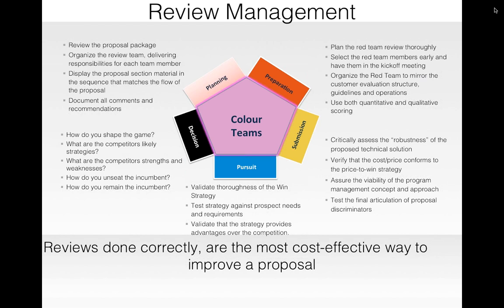Review management is a part of the entire bid management life cycle, because at every milestone APMP suggests you should have a gated review to see whether you need to take any corrective actions, whether you need to add new capabilities, or whether you need to drop the opportunity right at that level because you are not aligned, or your chances of winning are very limited.